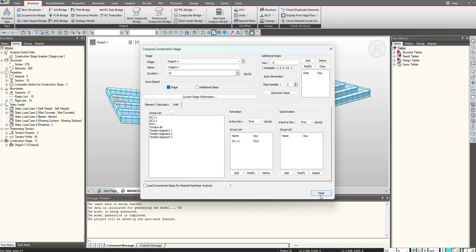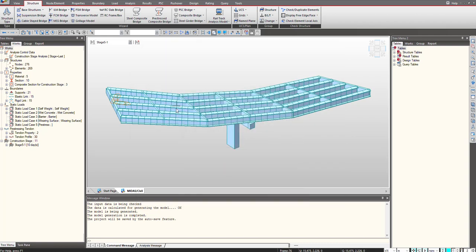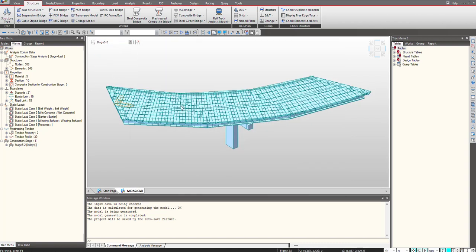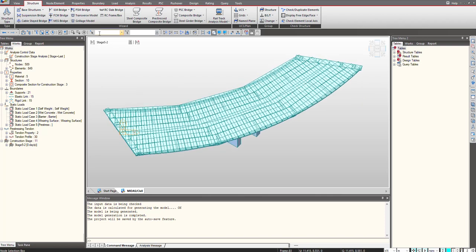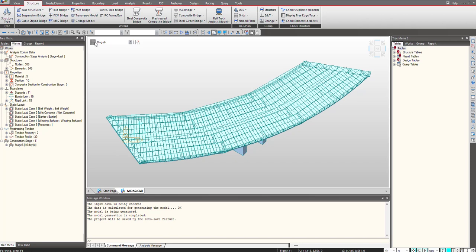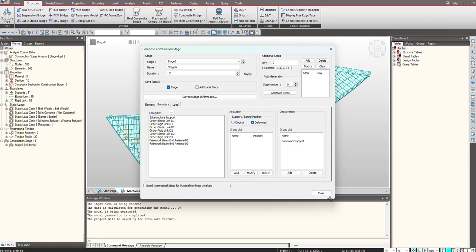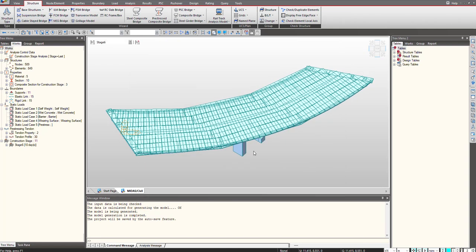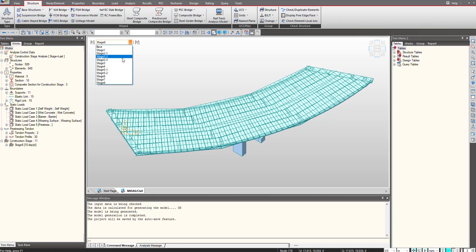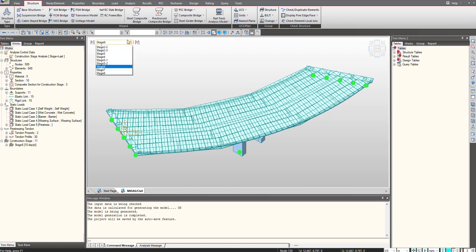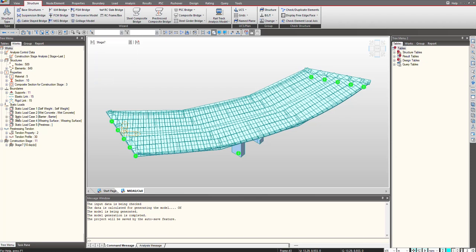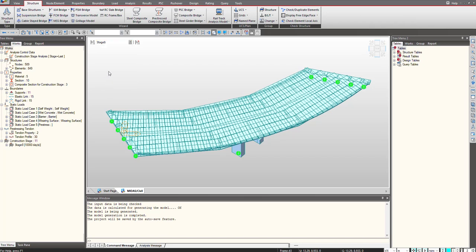Then under stage 6 the false work, the firm work supports has been removed. The temporary supports that you are having beforehand at the splice location, which are these, are removed in stage 6. Then stage 7 will have the superimposed loads of the crash barrier and the wearing surface. And the stage 8 will be the long term duration days.